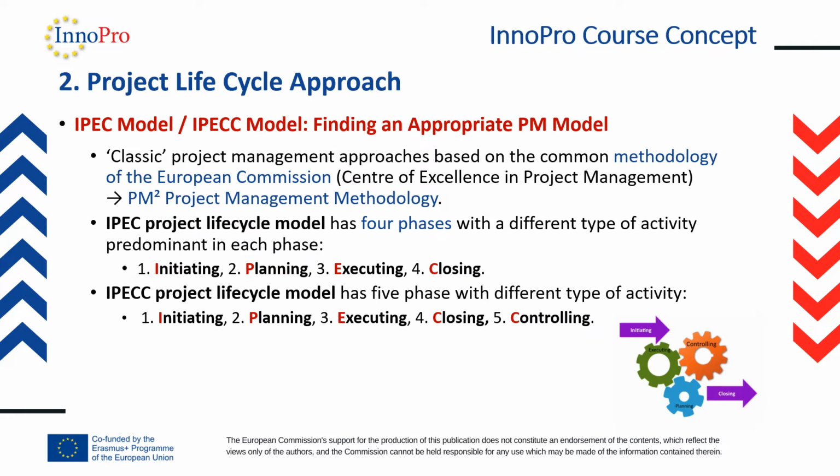When we were looking for an appropriate project management model that could be used in our Innopro course concept, on the basis of project cycle management and life cycle methodology, we generally started with the classic models of project management, presented as the IPEC or IPECC models. This classic approach is based on the methodology of the European Commission Center of Excellence in Project Management, called the Project Management Square methodology. The IPEC model of the project life cycle has 4 phases, with different types of activities predominant in each phase. The first phase is initiating, followed by planning, executing, and closing.